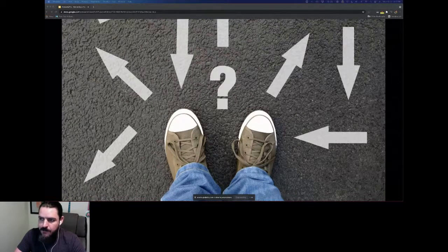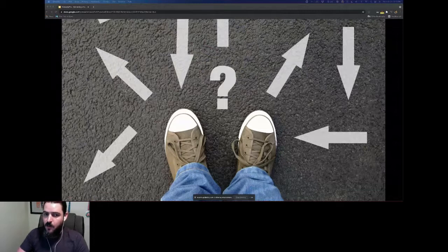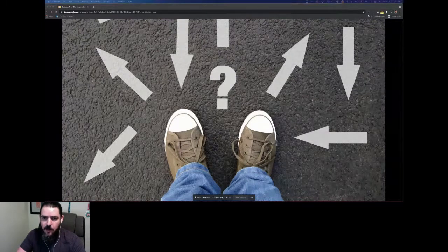Now, I'm not here to tell anyone how to run their business or what to charge or any of that, or even how to charge. But I will go over a little bit of how we work. And we work on a loose, agile process, which means we charge tasks for time and we plan things, and things are prepaid mostly. And we try to gather what's the most important feature requests from the client. We try to break those down based on our understanding of what all those tasks take based off our past experiences. And then we give a quote based off of sprints, and we run a sprint every week to 2 weeks, depending on what their process is.